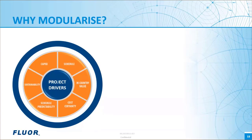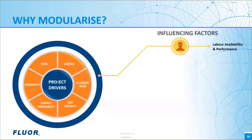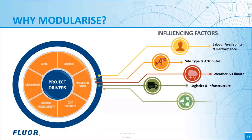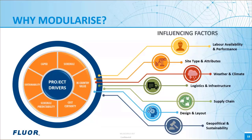A project must identify and evaluate the presence and relative strength of any influencing factors to recognize their potential impact relative to the drivers and goals. Influencing factors can be both project and site specific and may include labour availability and performance issues, site type and attributes, weather and climate impact, logistics and infrastructure constraints, supply chain synergies, design and layout restrictions, and geopolitical and sustainability requirements. Once the problems have been correctly identified and their potential impact understood, the project can determine what solutions should be applied to best address them. Modularization represents one solution amongst many that a project can consider and apply to de-risk the project.